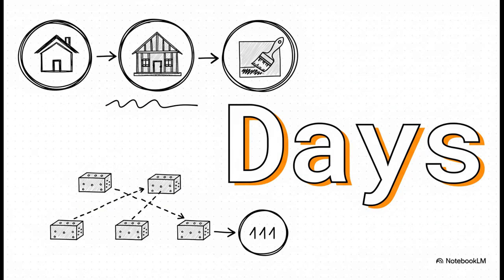And for our little project here, the critical path is foundation, then frame, then painting. So that's 3 days, plus 5 days, plus another 3, which gets us to 11 days. The plumbing path is also 11 days, but since no dependent path is longer, that's it. 11 days is the absolute fastest this project can get done. It's the longest path algorithm that gives us that magic number.